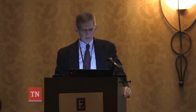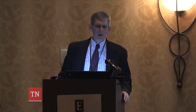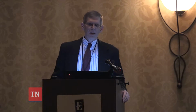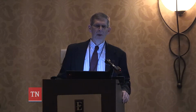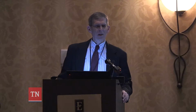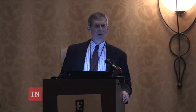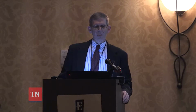Briefly want to talk about some other alternative contracting methods and what's next down the pike. For this administration, as Pam mentioned, they're all about schedule, delivery, and minimizing federal barriers that get in the way in the delivery process. And one of the low-hanging fruits that we still have not operationalized is something I call indefinite delivery, indefinite quantity contracting.